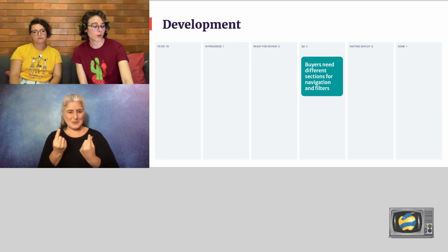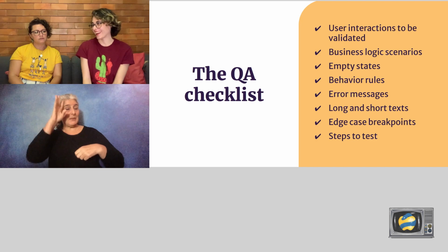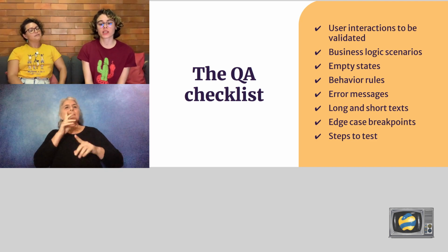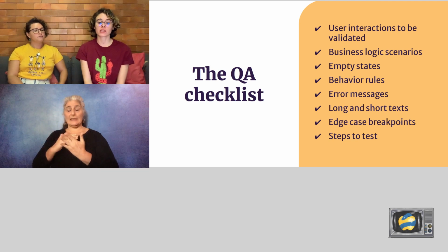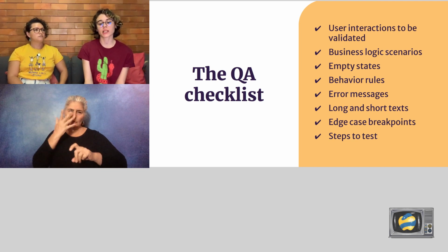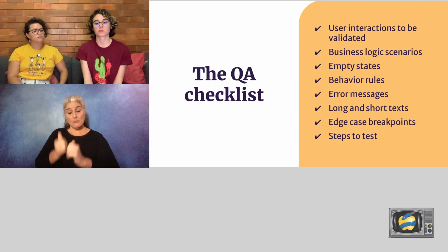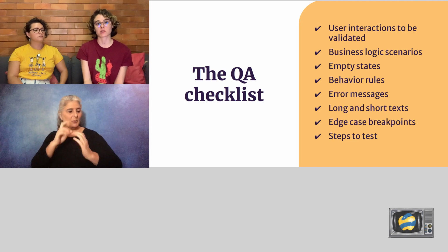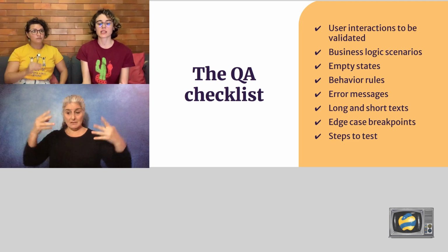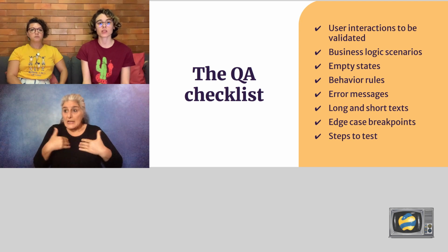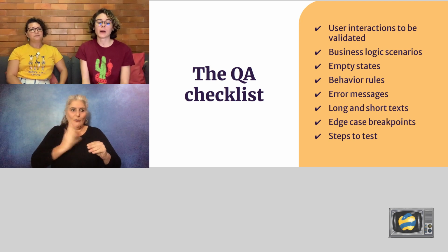So we came up with a very clever thing again. And the thing was just a checklist to improve the QA cycle. It was very simple, yet varies from test to test. And it would mostly describe the test purpose and implemented behaviors against the design specs provided. It seems very simple and unnecessary, since we already had this information everywhere.